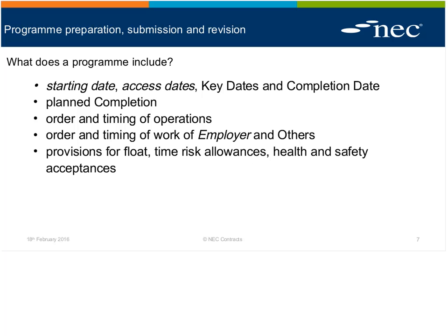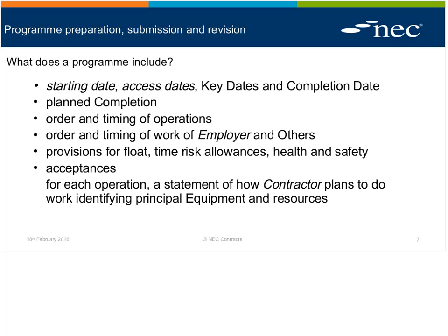And acceptance is indeed something that the program should show. Let me interject. What if on a program an acceptance is shown by the contractor as something required, which in itself, the period for giving that acceptance, is at odds with the contract data? Let me give it a slightly different way. Let's say the period for reply is 4 weeks, yet they've shown submission of design for acceptance and acceptance of design 2 weeks later, i.e. they've not complied with the contract.